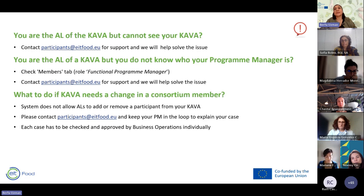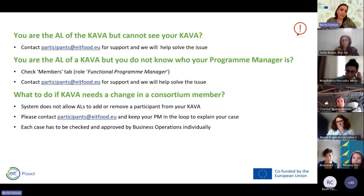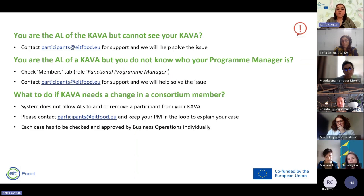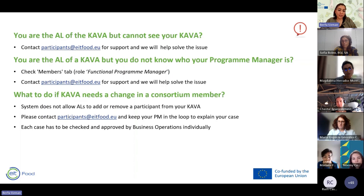Participant amendments are not among the list of things that can be amended. The system will not allow Activity Leaders to add or remove a participant, as new participants may need to complete validation and be discussed within the team. If you have requirements about adding a new participant, please contact us and keep your program manager in the loop. Each case has to be checked and approved by Business Operations individually, as each case is different.